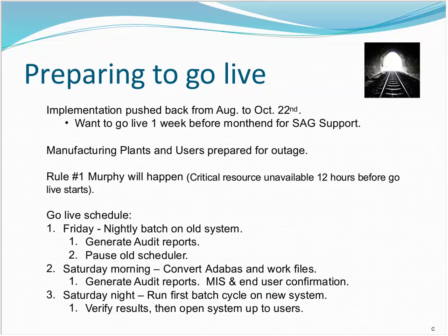So anyway, when we're ready to go live, we haven't met our August deadline, which was what we initially planned. Again, most of the problems were the work files and the user acceptance testing. So we decided to go live on August 22nd. Now, we had to go live right at the end of the month. Part of our contract with SAG was that they were going to put a person on site here to sit with us when we go live for a week.